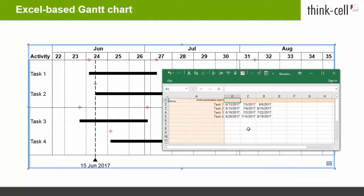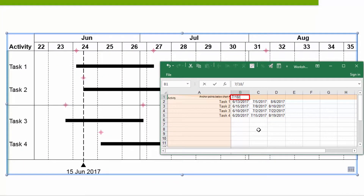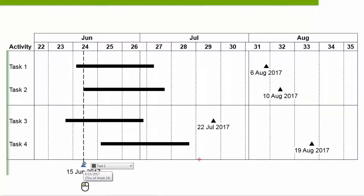To link milestones in the special row below the Gantt chart to the data sheet, type their dates into the first row of the data sheet and anchor the milestones to the anchor points.